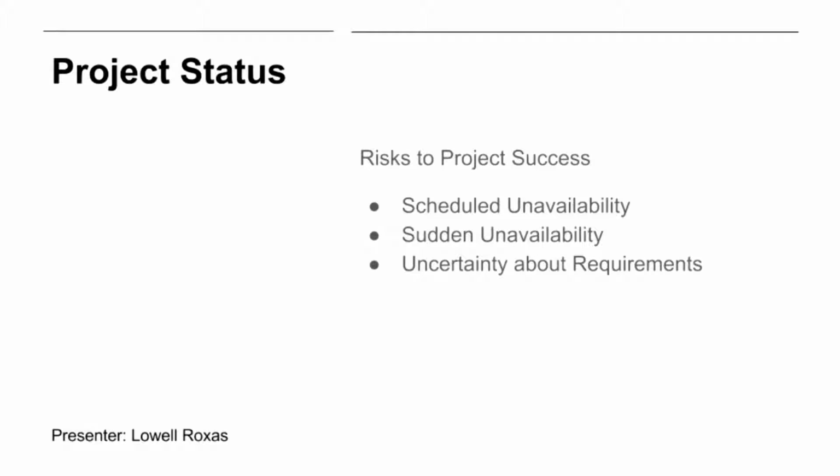During the course of a session-long project, a lot of mishaps can happen. We got the most predictable of them out of the way first: scheduled unavailability. When we first started working, we laid out times when we'd be unable to work on the project for at least 2 days. The advance warning let us work around our schedules.